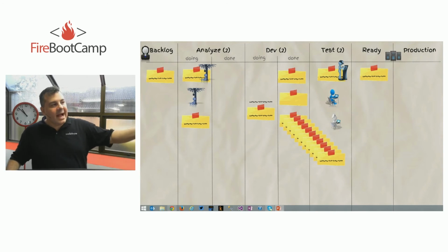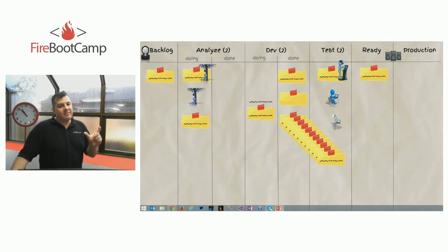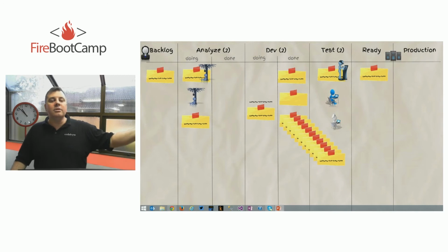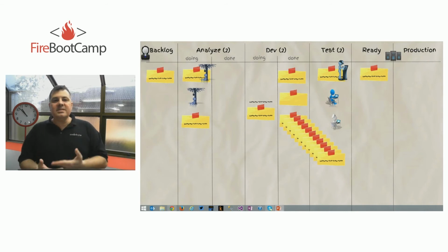And looking at that, you can actually have a column for that shared resource. Obviously, that shared resource is not going to be available to you all the time because 3 different projects are trying to get his attention, right? So from a project management point of view, you can look at that, you can maybe assign a different column to that person, and you can say, okay, this is how we're gonna manage his time, and this is how we're gonna limit his work. But the whole idea of this exercise is limiting the work that you are doing or your people are doing.